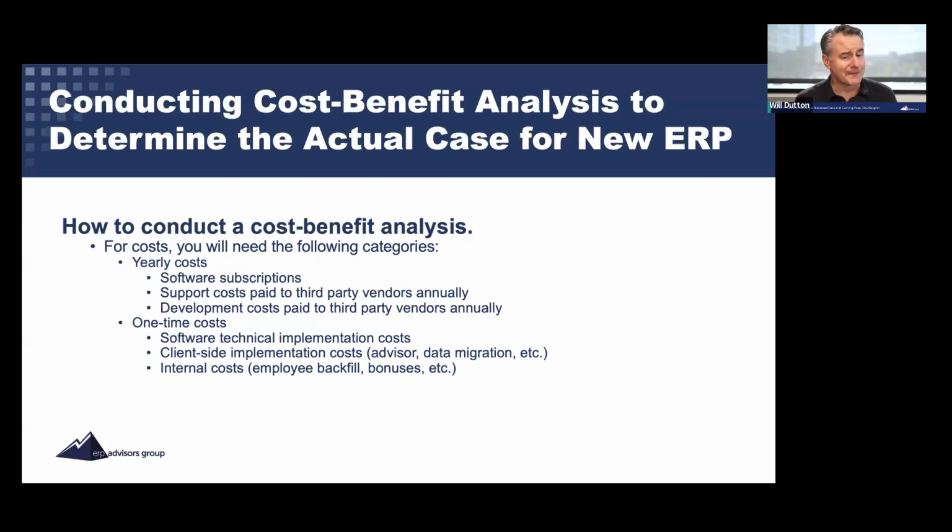And then this gets to the biggest cost item on one-time costs, honestly. And it's really tricky, because implementation partners and software vendors will say, here's what's required from your people. We need 20 hours from a PM, 20 hours from a lead, and we need your subject matter experts to participate 15 hours on average across the project. Well, how long is the project? Oh, it's a year. And we need a project sponsor, an executive sponsor, and some other people. And we have 6 SMEs.